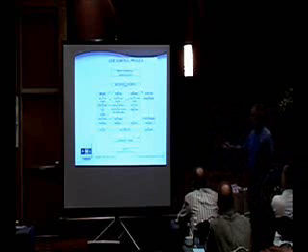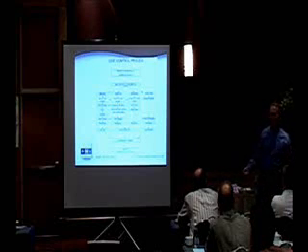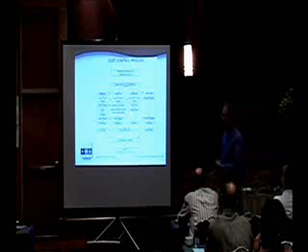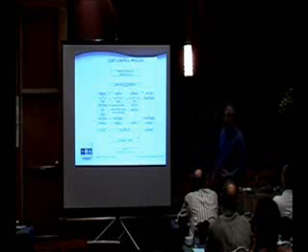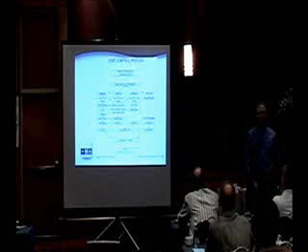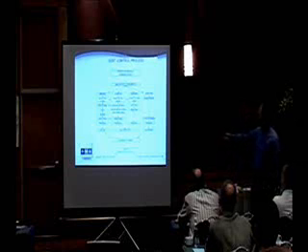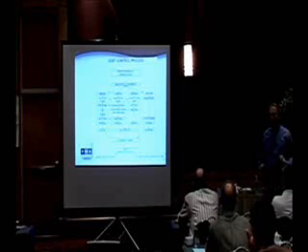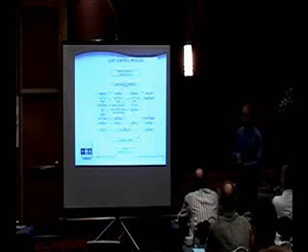And in a sense, instead of sending out elaborate 150-page requests for proposals to our trade contractors and our suppliers, what we want to do instead is have them all documented in a production manual of some sort. Do we have one in the back? Russell, get one. We have a template one. And with standard details, etc. We have to have those. Otherwise, we have no way for us to measure what our cost truly is.